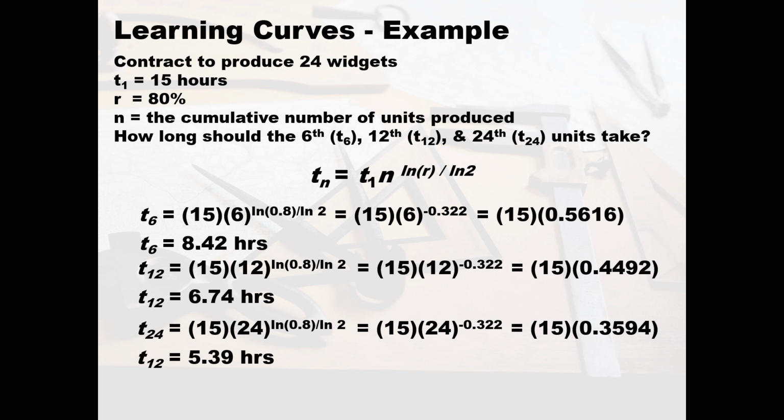So this is how you calculate the learning curve. You can plot these numbers on a curve to get the actual line of the curve. You can continue on until you start to see it flatten out, just in case the client comes back and says, we want to know where you are at 48. Your price is good at 24. Let's see where you are at 48. And you can take that and calculate it.